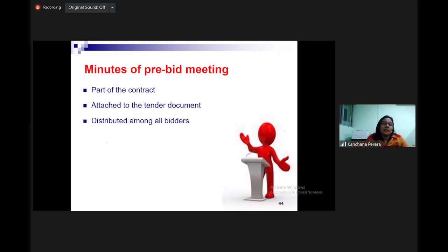According to the government procedure, we were questioning, sending queries, and everything he answered. We had to award the contract to that bidder. What had happened at the end of the day? It was a real mess. Why? He had priced unrealistically low without seeing the context, the difficulty of the work. So every time, poor consultant, myself, had problems. Why? So many variations and so many troubles from the contract.